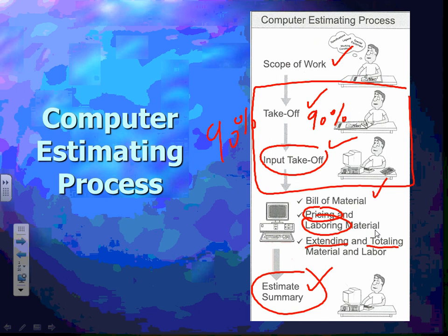AutoCAD takeoff, guys, is they tie the software into, I'm not sure if they do Revit, but in CAD, they identify all the symbols that you do, Derek, in CAD. So a symbol of a receptacle will be identified in AccuBid or McCormick. And then when you tie the two together, it sucks all the information directly from AutoCAD into the system. My understanding, when we went to Parsons, is they don't use it a lot because there's a lot of confidence you have to build. If you do design build and you have your own symbols, then you can identify them in both softwares. It pulls the information directly from CAD.